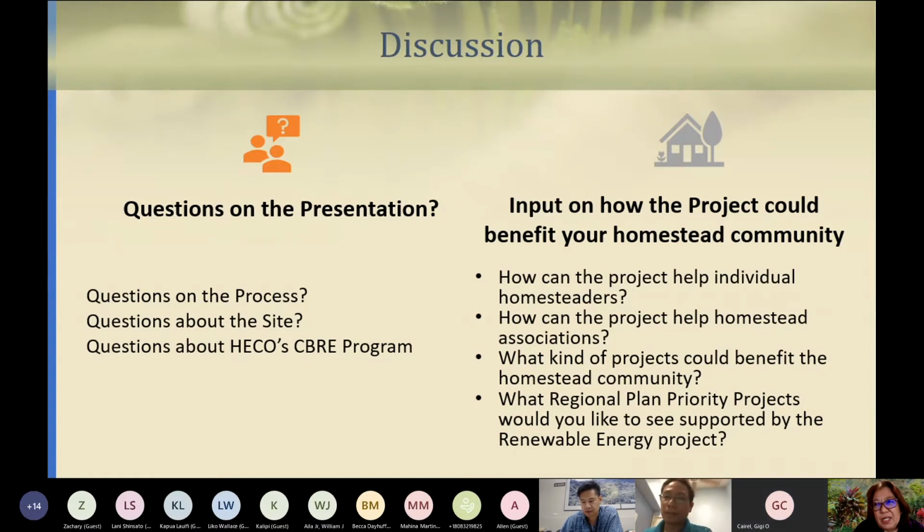And that's because it would have substantial impacts, so it's not an exemptable activity. The department and every other government agency has a list of activities that are exemptable because they probably would have a minimum impact. These are things like buying paper clips, painting your house, repairing an existing structure, changing the roof, cutting the grass. So this type of project does not fit those type of minor impacts.